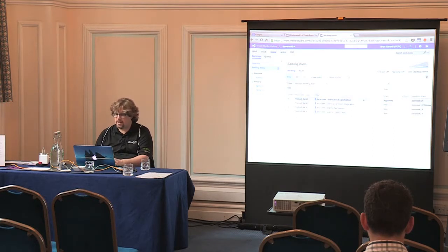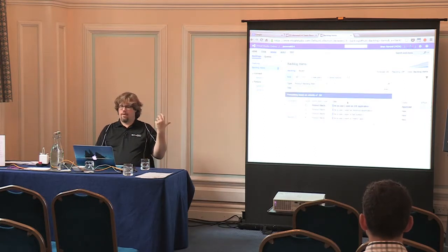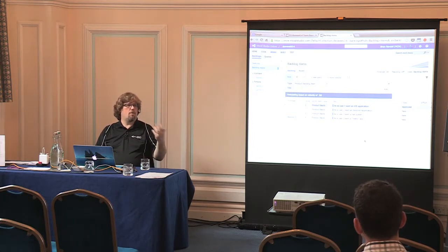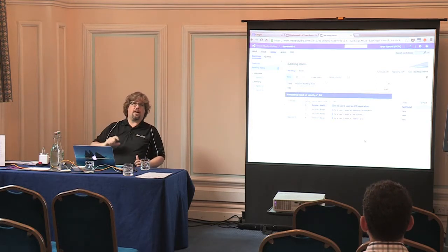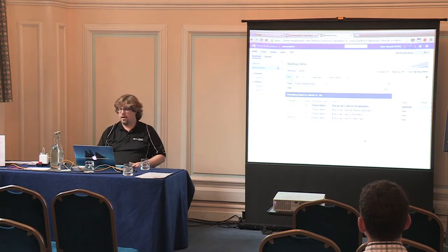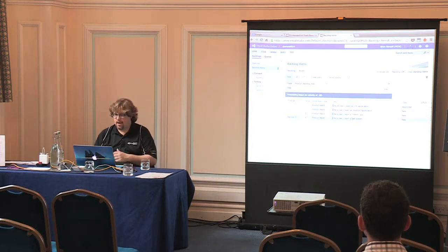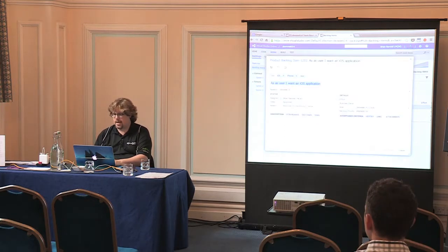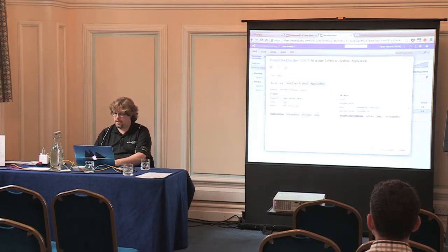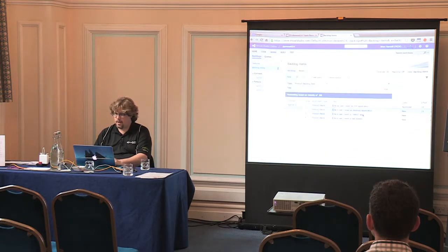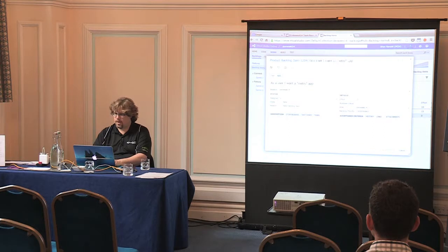Works really nice. This bar you see here is going to be related to velocity. If we turn on forecast, it's going to say, well, based upon a forecast velocity of 10, you can get everything done because we don't have any history. Once you start having history and providing that effort on a consistent value, it'll show you, just by looking at the forecast lines, how much you can get done per sprint based upon their sort order over here. And so I can move that down, et cetera. So if we wanted to, we can say that this has an effort of, we'll say 10 story points. And we'll change the Android app to be 15 story points. Change the Metro app to be 20 story points.